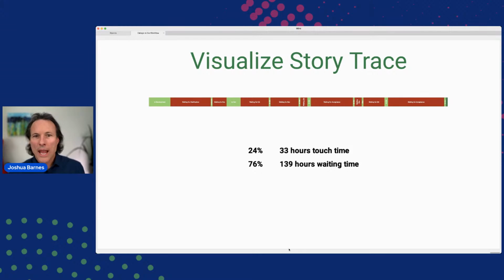However, if we have something like this and we're able to really reduce or eliminate a lot of this waiting time, there could be multiple things that are causing waiting. In the case that I've used here, it could be our absentee product owner. We've got a skill that's in short supply, like some of our team members with testing skills. And we've got some people with a unique skill set from shared services. So there could be multiple things affecting all of this waiting.